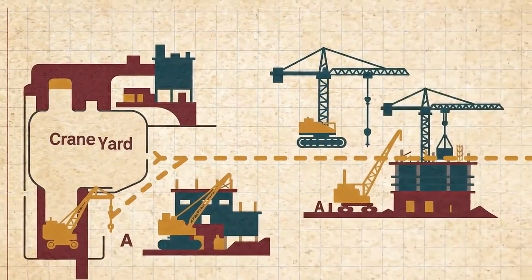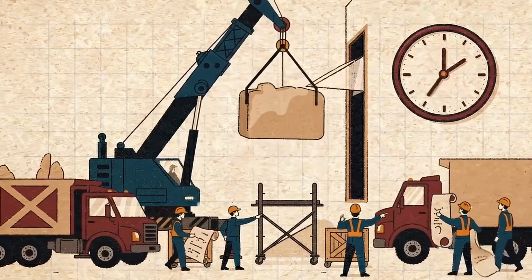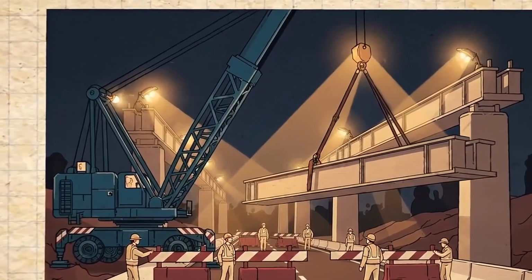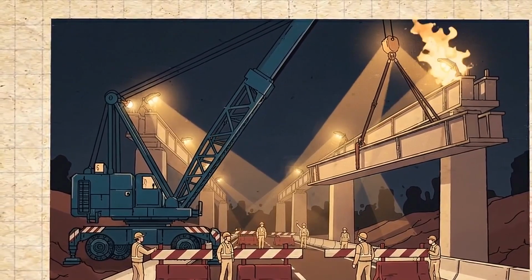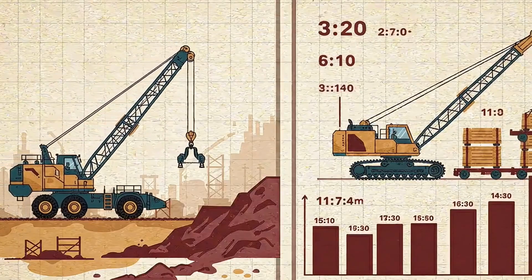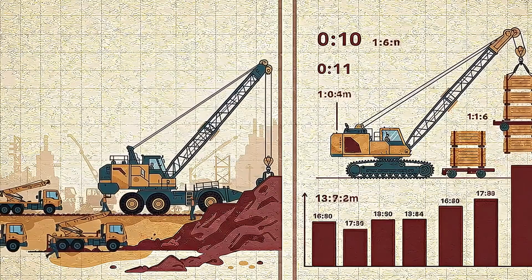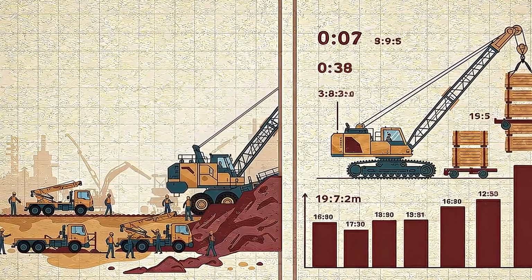For the Indianapolis job, the commercially useful number is not the crane's theoretical maximum. It is the contractor's stated requirement at roughly a 120-foot pick radius, combined with the need to fit the site and the overnight sequence. Real jobs are defined by the load, reach, setup, site, and schedule together. For the customer, then, the product is already becoming more complicated. They are not renting 900 tons. They are renting a solution that has to exist at one exact point in the project, and before it can exist there, it has to arrive.